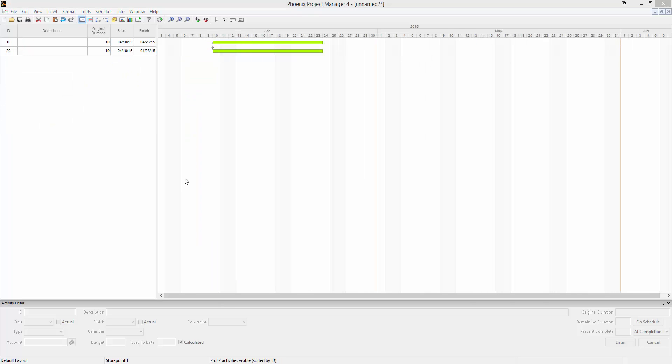All of these different relationships can have what's called a lag. A lag is a duration that's on a relationship. For example, these two activities have a start to start relationship with a five day lag.